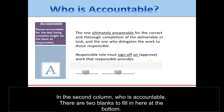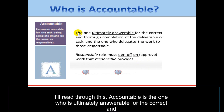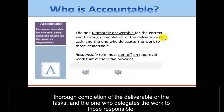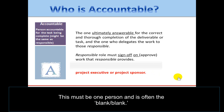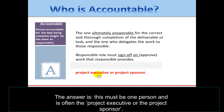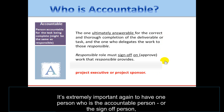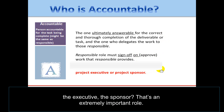The second column: who is Accountable? This must be one person and is often the project executive or the project sponsor. It's extremely important to have one person who is the accountable person — the sign-off person, the executive, the sponsor. That is an extremely important role.